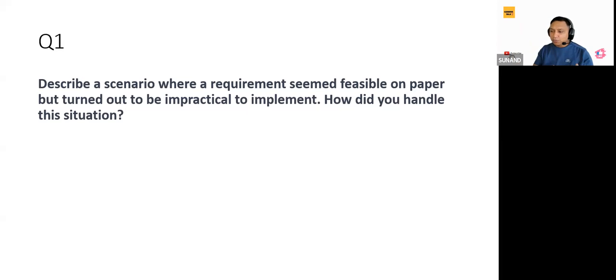The project team took this experience as an opportunity to improve their requirement analysis process. They decided to involve compliance and risk experts earlier in the process to identify such challenges proactively. So while the specific requirement was not implemented, the project continued successfully with other enhancements and features that aligned with regulatory and technical constraints. I hope you like this answer. Let's move forward.